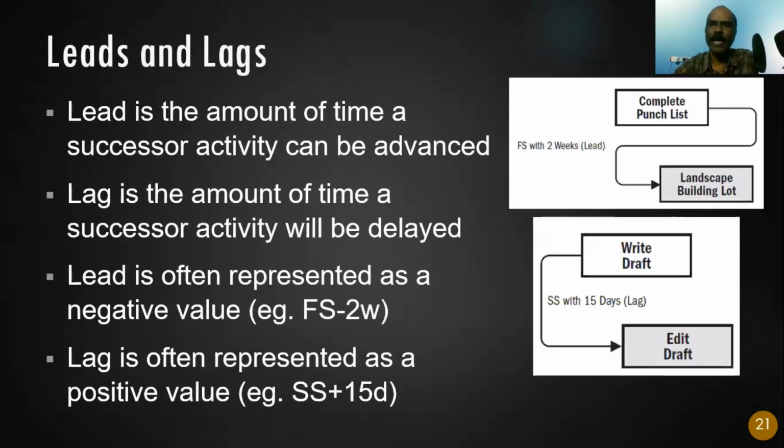Now lead and lag. So what is lead? What is lag? Lag is waiting time, right? As we have seen before, some examples I showed you. Lag is the waiting time. How much time you need to wait before the second activity can start? Like for example, I start the design, I wait for 30 days to start the construction.